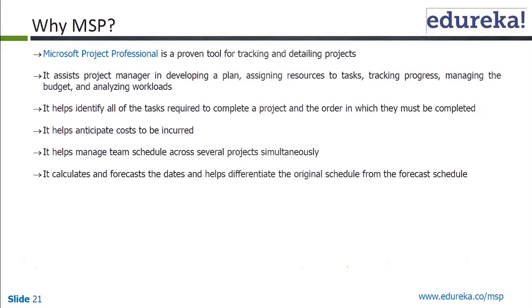Once revisions are okay and the plan is in place, you can baseline them. In case there is a change request that has occurred, you can re-baseline it. So all those factors are available with Microsoft Project Professional. It gives you, so once you have put a plan in place, the second thing you want to do is tracking.